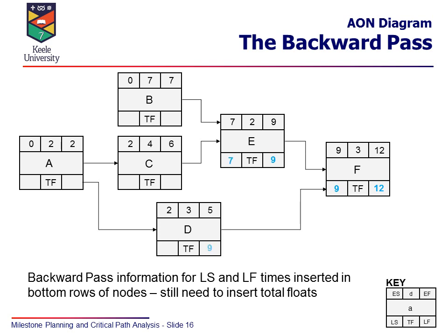So I've done activity E there. Activity E, latest finish 9, duration 2, so the latest start time is 7. Activity D I've filled in similarly. I'm not going to go through every one, but then we can work back from there. Activity B, the latest that can finish is 7, takes 7 days, so the latest it can start is day 0. It has to start straight away.